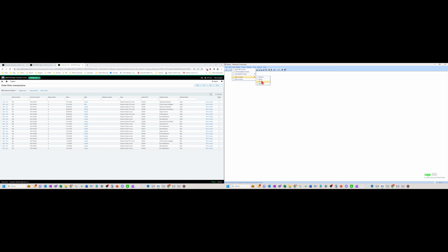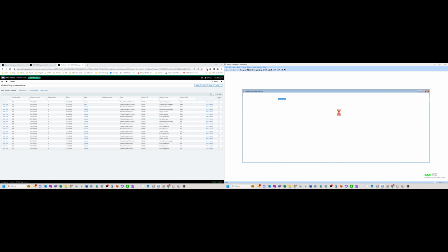At times it doesn't come through to the screen. So until you maybe go here and look and see, okay, maybe I want to check the status of this. Maybe it didn't get pushed all the way through. It's going to tell you here. That's where you're going to get clued in. You might not catch it till far enough along. You can make this a step in your process to check this status before you print final, but it doesn't give you much of a warning in 300. Okay.